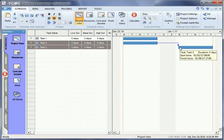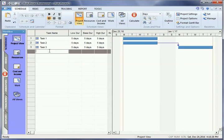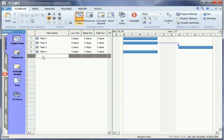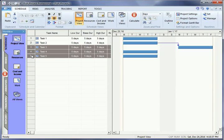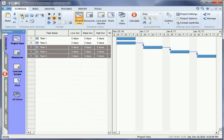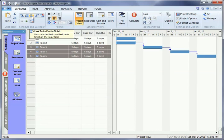Next highlight tasks 3 to 5 and left click the Finish to Start button. You will now have a simple project schedule with links defined between the activities. You can define Finish to Start, Start to Start, Finish to Finish, and Start to Finish links.